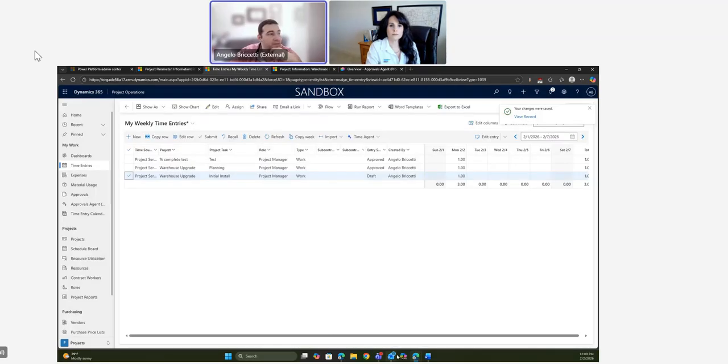And then there's a Power Automate flow, which runs in the background. That Power Automate flow will grab the relevant data about the submission, send it to Copilot Studio to the agent, and then the agent will get the policy document that's relevant for the type of submission, because there's separate policy documents for time, material, and expense submissions, and it will compare the two. It will say, here's the submission and data about the submission, here's the set of rules that the business has decided are relevant for this type of submission. Does this submission meet these rules?